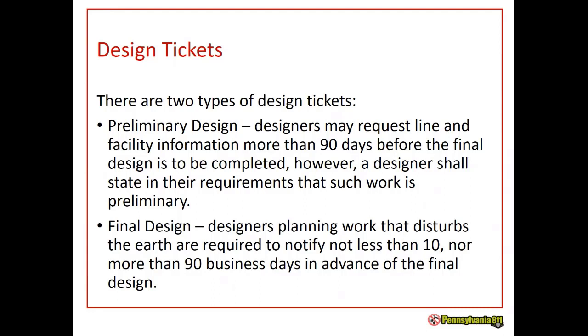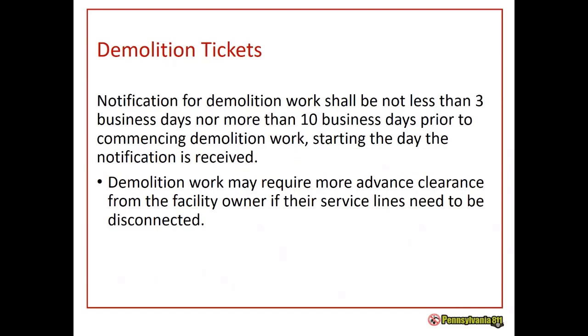Also, if you are a designer, make sure you are looking at the responses that you are getting back from the facility owners. If you get the code 082 design conflict, under the statute, you are required to send plans to the facility owner to mark them up, and then they send them back to you so that you know where their facilities are. Also, the facility owners are not required to mark their facilities on any of the design tickets, like Kevin said earlier. And also, you cannot dig on a design ticket.